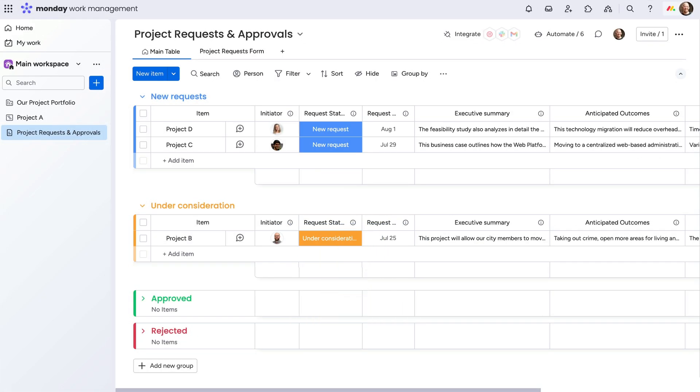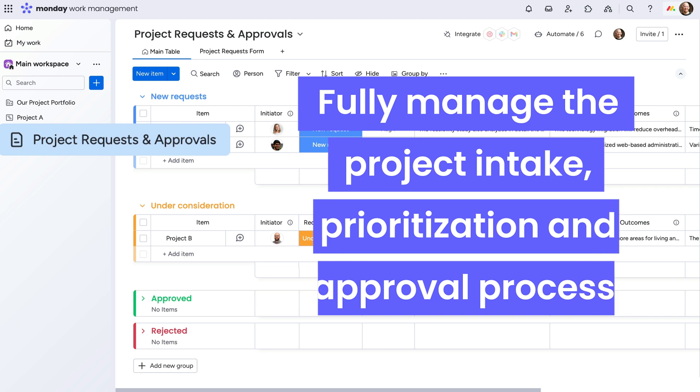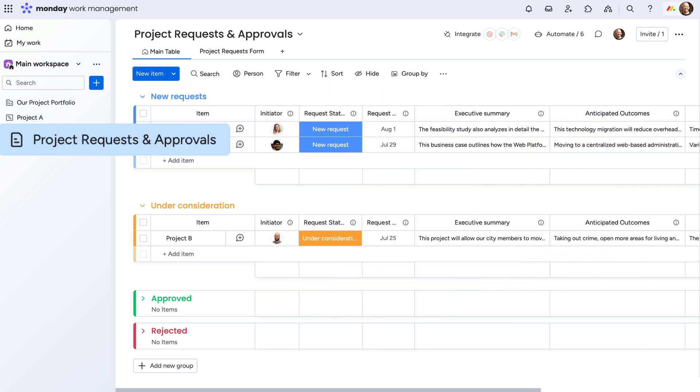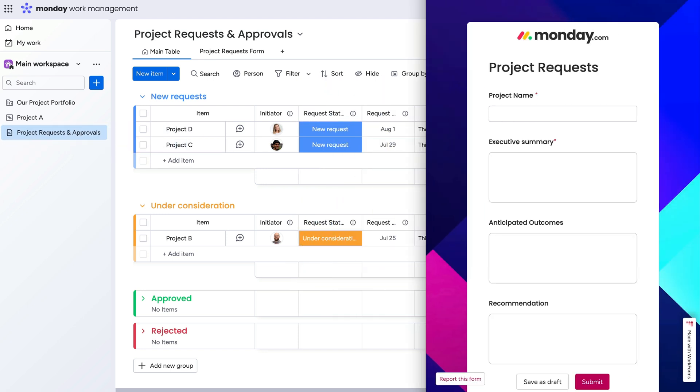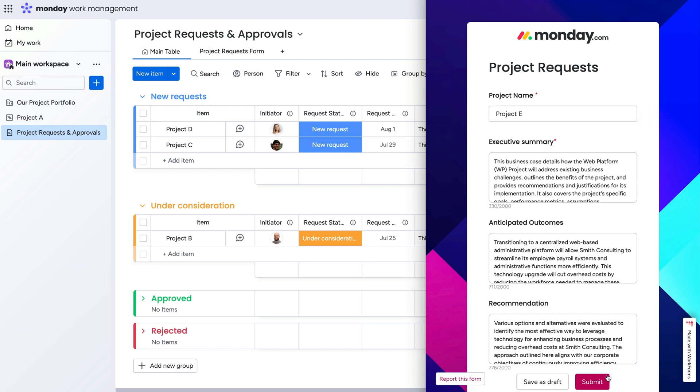Something our team did, we created a project requests and approvals board to fully manage the project intake, prioritization, and approval process. We built out a work form with key questions to jumpstart any project request.